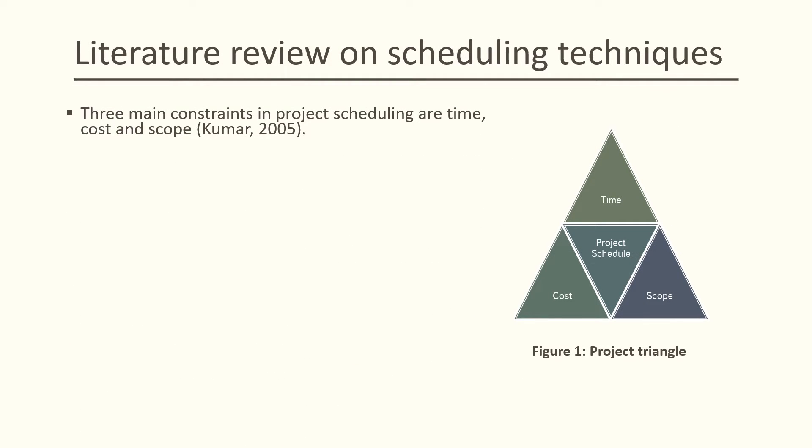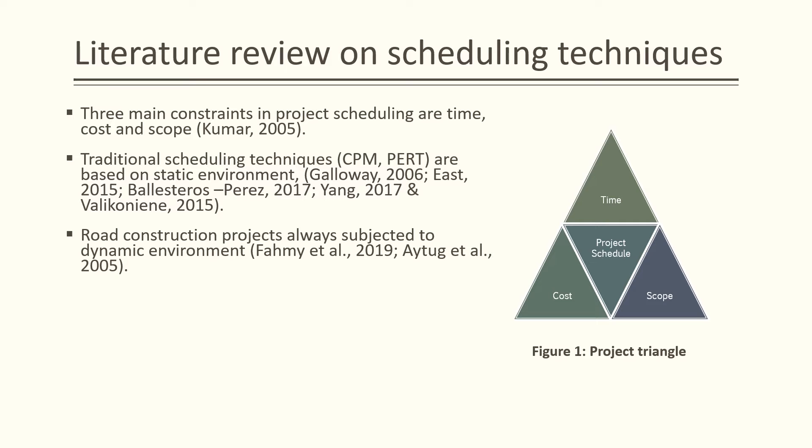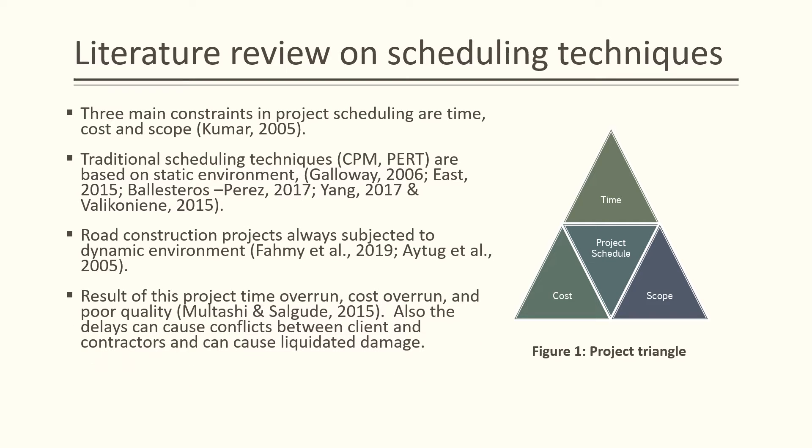In the literature review, it has been identified that project scheduling works on three main constraints: time, scope, and cost. To achieve that, there are a number of traditional scheduling techniques available, such as the Critical Path Method and Program Evaluation and Review Technique. However, all project scheduling techniques are based on two main assumptions: availability of a complete schedule and a static project environment. In road construction, project activities are always subjected to a dynamic environment. Due to the gap between scheduling techniques and the project environment, the industry always faces problems of projects being behind schedule, over budget, and poor quality. Traditional techniques are not practical to apply in roading projects, where project planners need better tools to tackle real-time events. None of the present or past scheduling techniques accommodate these real-time events. This research is focused on providing an extra tool for planners to accommodate the dynamic nature of roading projects.